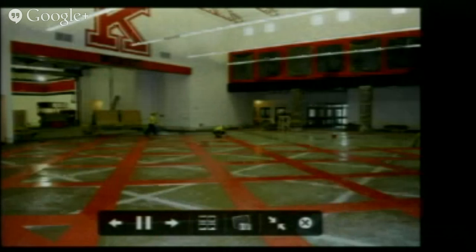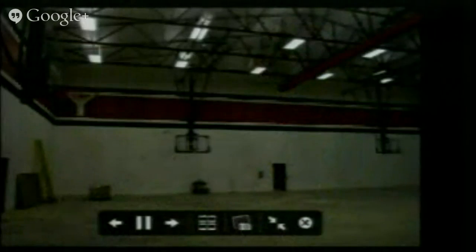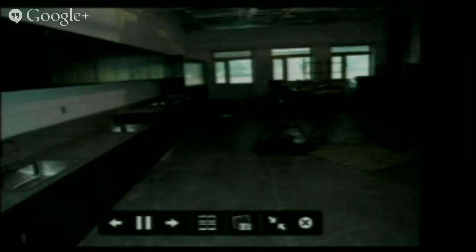And then your common areas, your C, D, and E, they're finally doing the terrazzo flooring in the cafeteria. That's the picture behind me with all the red stripes in it. That's only partly done. They're also finishing up some of the kitchen equipment, finalizing the plumbing and electrical work in there, and pretty much just doing finishes. In the gymnasium, they started the wood flooring today. They have the subfloor started to go down. Gym equipment's up, such as your basketball hoops, and your divider curtain has been installed. That's where they're at on that.